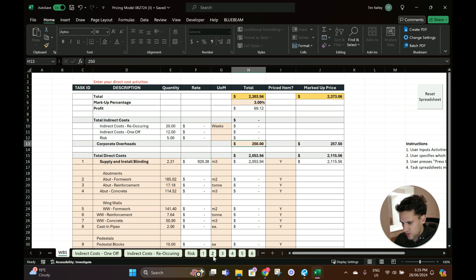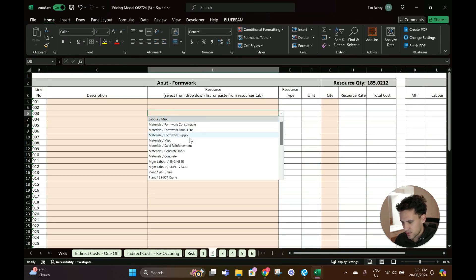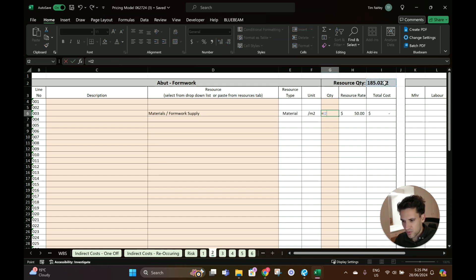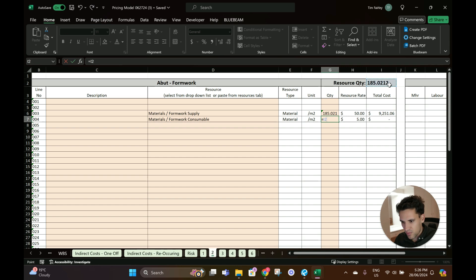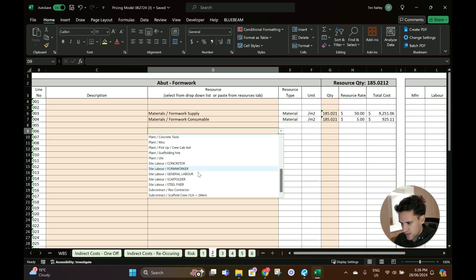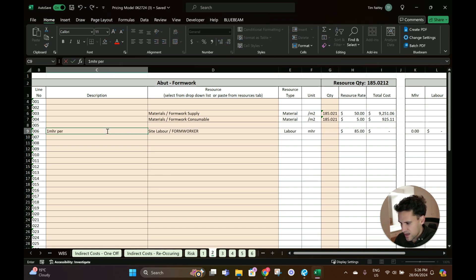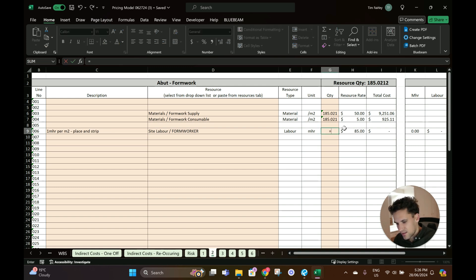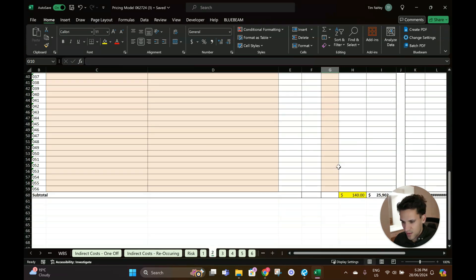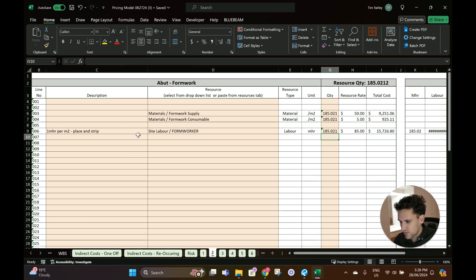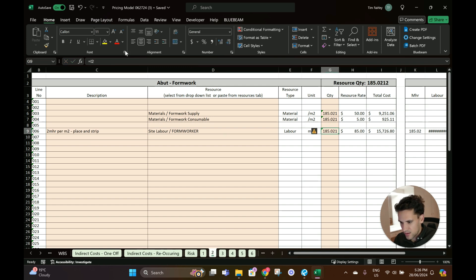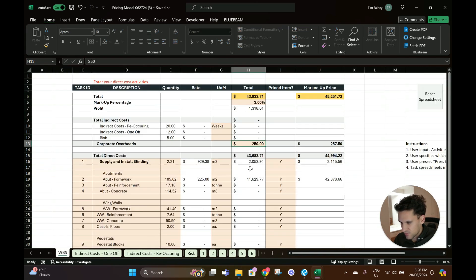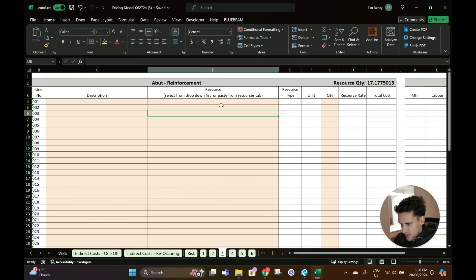Formwork - 185 meters squared of formwork. We need consumables as well at $5 a meter squared. Let's say one man-hour per meter squared to place and strip. Actually, that's probably an aggressive assumption - two man-hours per meter squared, a bit more realistic. So that's the total for that activity - $40,000 is the total, so $225 a meter squared.